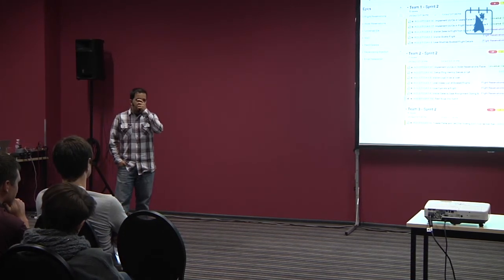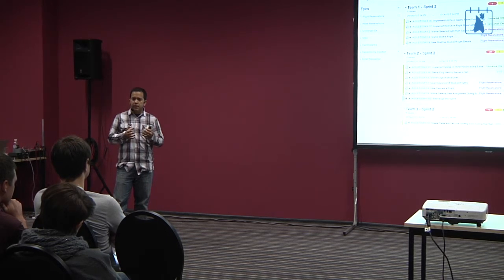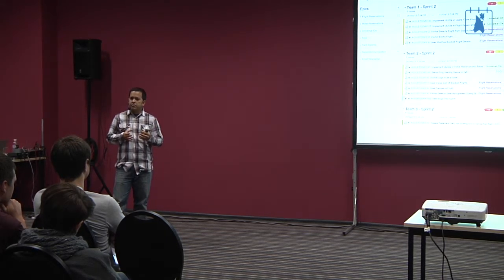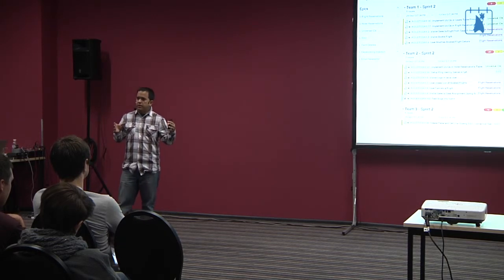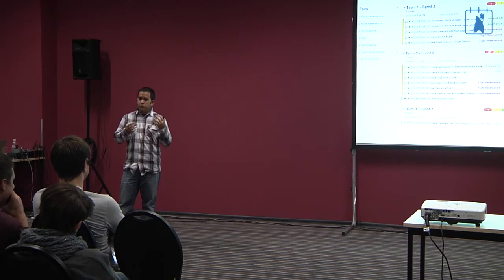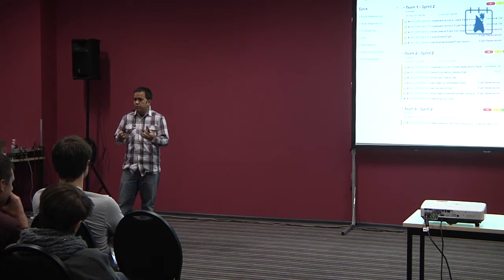Well, the decision that they need to make, yes, the team decides. So at that point, there's an understanding that from one release we're going to have multiple sprints for that release, right? We have 100 points total, but 20 points of those are going to be done from the architecture work. At that point, they can pick and choose which stories they're going to do in what sprint, but we understand that the release is going to include certain stories that are being prioritized more highly.